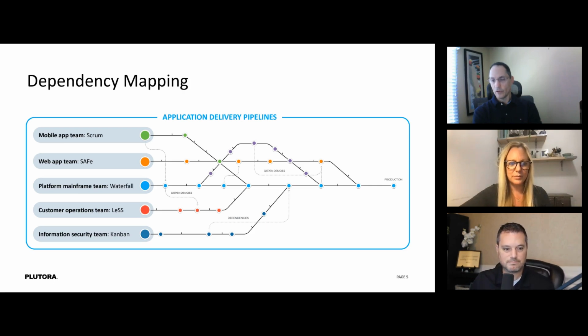And to flush out, Ellen, I think you used it earlier, or maybe Jeff, the exceptions, right? What are the things we want to look at? Right, when you're dealing with 1,100 some odd user stories, I don't need to look at all of them. I need to look at the ones that are in trouble. And how do I know which ones are in trouble? I can tell by the state and the timeline and where we are relative to our release, right? The closer you get to the release, anything that's not accepted by the product owner becomes a risk.